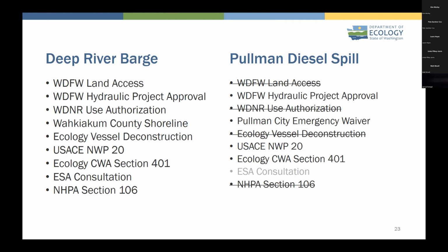In this one, it was Pullman City instead of a county. So in the Deep River, we were dealing with a county. In this spill, it was in the jurisdiction of the city. So similar process, similar waiver, but city versus county. Didn't have to deconstruct a vessel. We fell under Nationwide Permit number 20 for this one as well. We got Ecology Clean Water Act Section 401 consultation for both and approval for both.